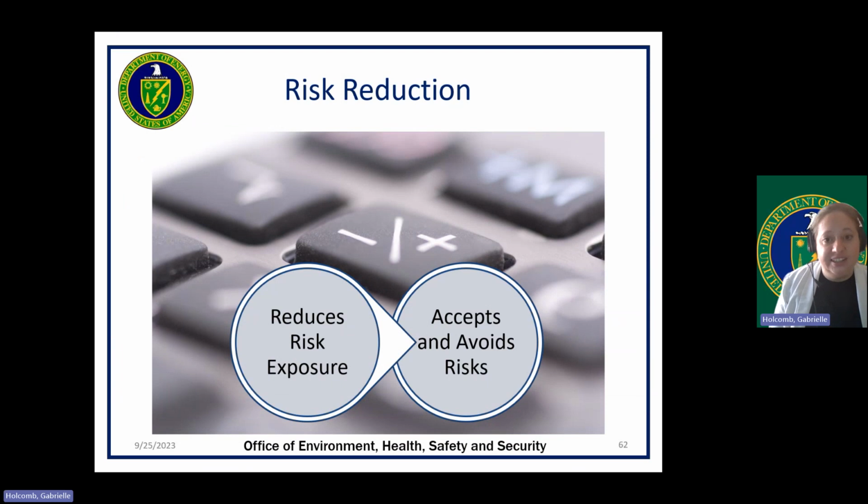Risk reduction is the most common risk management strategy used by most businesses. This strategy reduces a company's exposure to risk by taking actions. It is a strategy employing a bit of risk acceptance along with a bit of risk avoidance, or an average of both. An example of risk reduction would be a company accepting that a disk drive may fail and then avoiding a long period of failure by having backups.